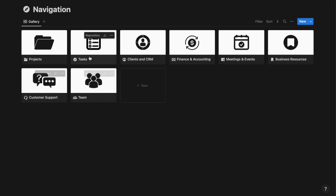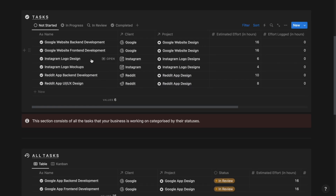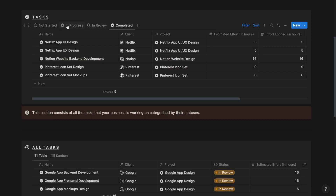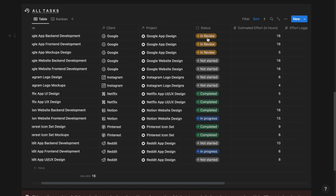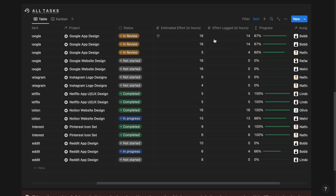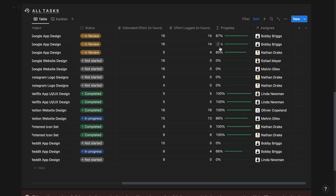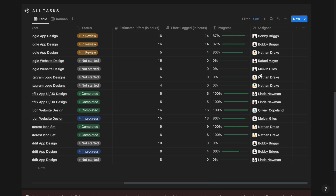Next up, we have the tasks section. From here, you can track and manage all your tasks that come under your projects. Here, you can track all your tasks based on status: not started, in progress, in review and completed. And from this table, you can track and manage all your tasks irrespective of their status. We have the name of the task, the client the task belongs to, the project the task belongs to, the status, the estimated effort, the effort logged, the progress of the task, and the assignee the task has been assigned to, which is your team member or your employee.